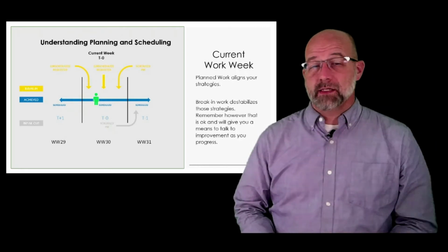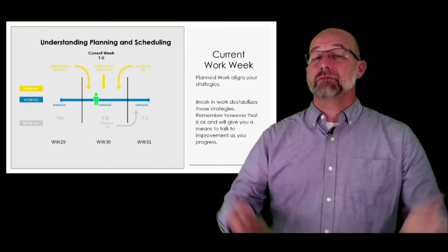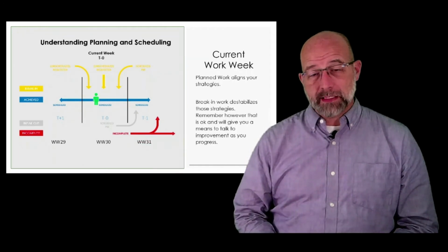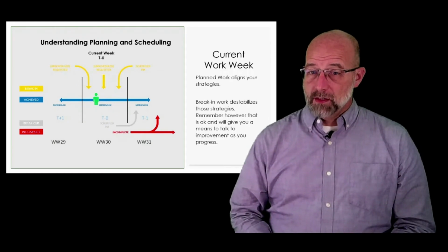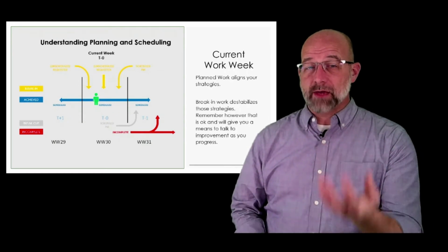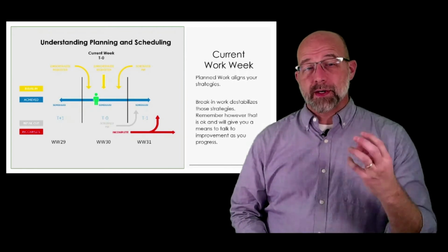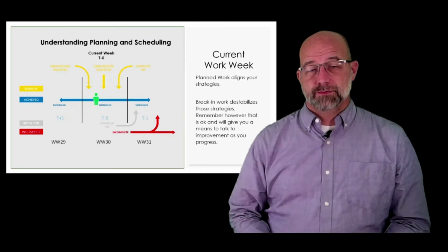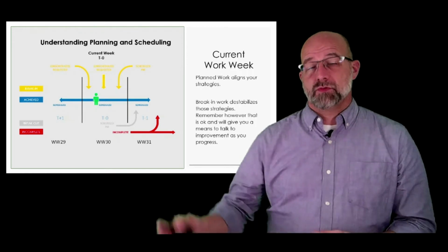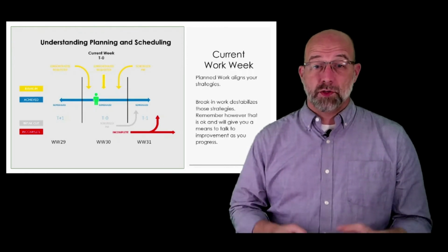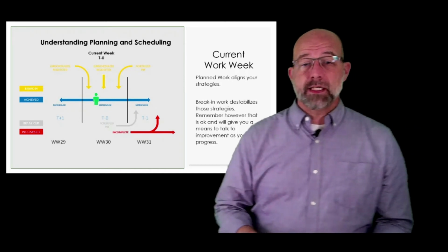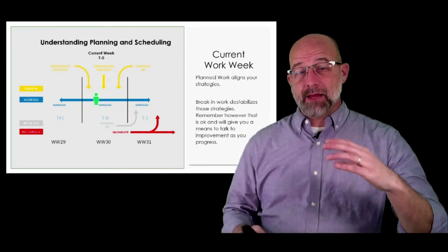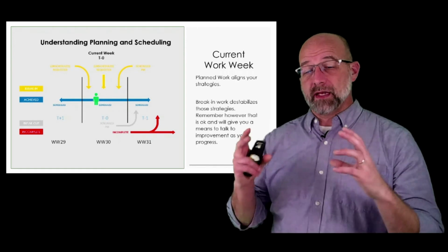Break-in work comes in, you already have something scheduled, so you're going to have those incompletes. But we have to try and mitigate this. So, this is what it is to have a talking point. The break-in work that's coming into your schedule and pushing those work orders out, or pushing the schedule of your project off a little bit, you need to look at the ratio between the incompletes and that break-in work and make sure that they are very close together.